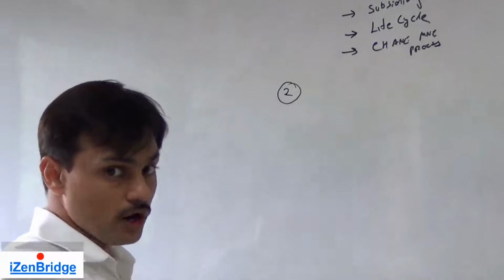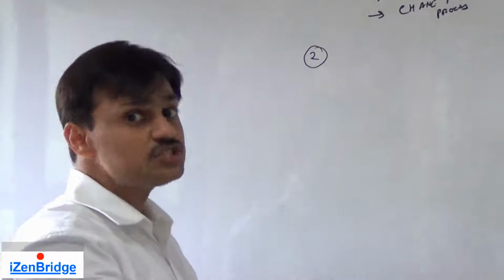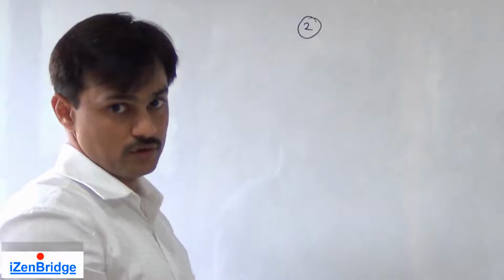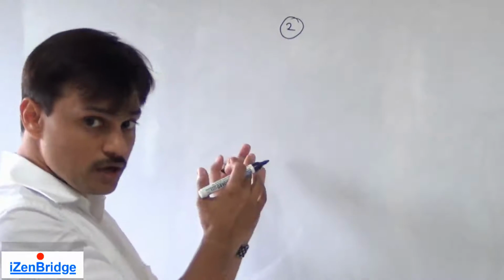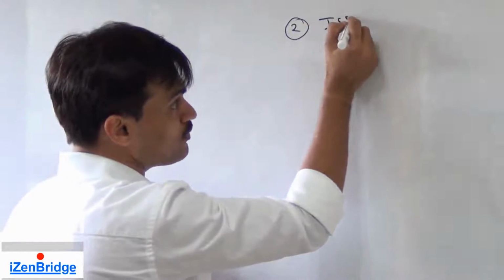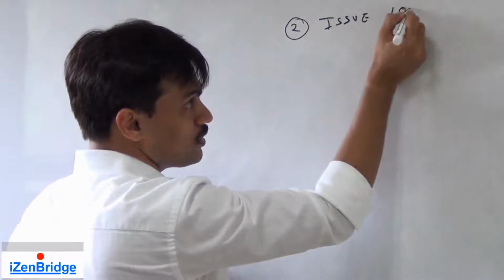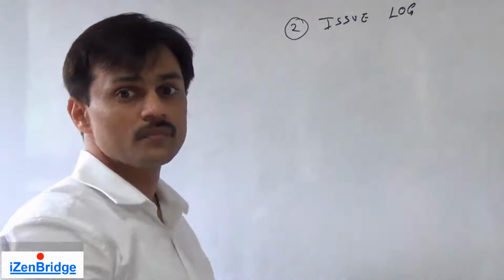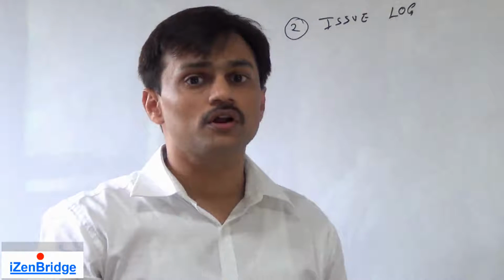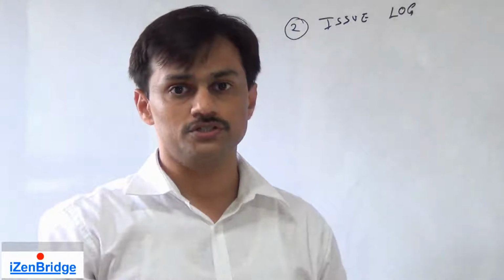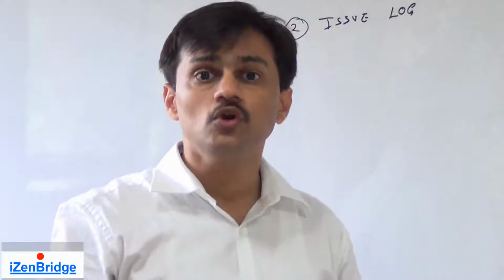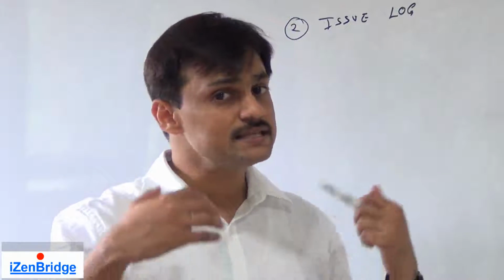execution, or while we were managing stakeholders, there were some issues which we could not resolve. So the issue log is a second input, which is coming from working with stakeholders. Now we got the issues which were raised or remain unresolved from stakeholders. We need to look at how our work is going. So we need to look at work performance data.